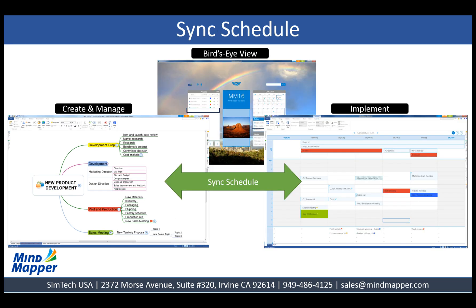Once linked, schedule on the map syncs with the schedule from the planner and vice versa, and any new schedule entries from the map will appear in the planner and new entries in the planner will appear on the map. This mechanism of going back and forth between project and planner is what makes Mindmapper 16 a unique tool that will help you manage goals and time more effectively, as you can view entire information on a map and implementational details in the planner.